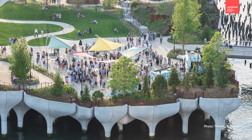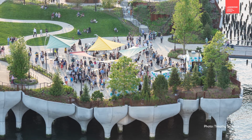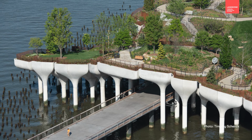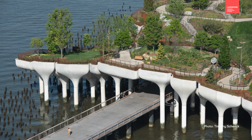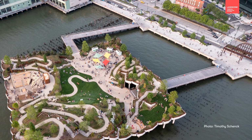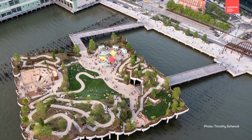And there was always a concern, and I've experienced this with many designers and owners, the fear of the void, as I call it, of emptiness. Was it too big? Was it too small? How many people could fit into it comfortably? And so we did a lot of precedent studies of places around the world to see what that scale was and see if it felt right. There were some technical logistics, the most significant of which is allowing a fire truck to come into the pier and turn around in one maneuver and exit. So that was an influence on the overall size.